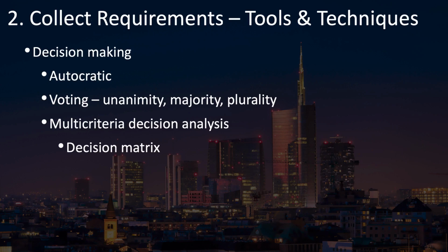Factors that you can use for your criteria could include any number of things, such as cost, benefit. You could even run NPV analysis on some of these requirements. Risk could be one. You may want to significantly weight the amount of risk that's involved in individual requirements. This can include the range of possible value.